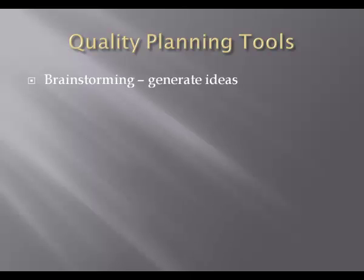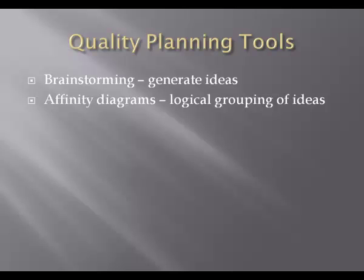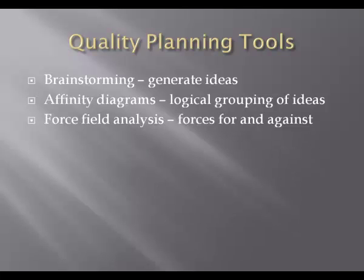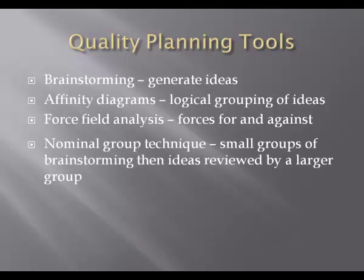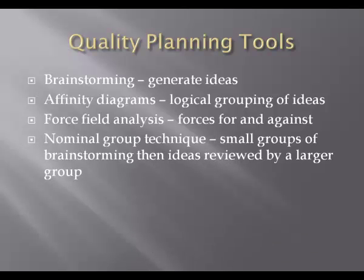Some quality planning tools you'll need to be familiar with for your PMP exam. First, brainstorming — you generate ideas on how to ascertain the expected level of quality. An affinity diagram is like brainstorming, but you group ideas based on similarities so that brainstorming and lateral thinking can focus on certain portions of the project. A force field analysis is an examination of the forces for and against your project and their impact, influence, and interest on the project. The nominal group technique is similar to brainstorming, but ideas are ranked by a smaller group and then reviewed by a larger group.